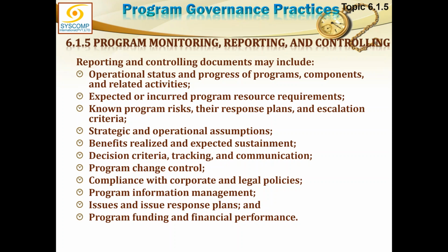So we can have expected and incurred program resource requirements, known program risks, their response plans and escalation criteria, strategic and operational assumptions, benefits realized and expected sustainment, benefits realized decision criteria, tracking and communication, program change control, compliance with the corporate and legal policies, so on and so forth. There could be any number of reports, but these are some indicative reports which could be there. So this is part of the program monitoring, reporting, and controlling.